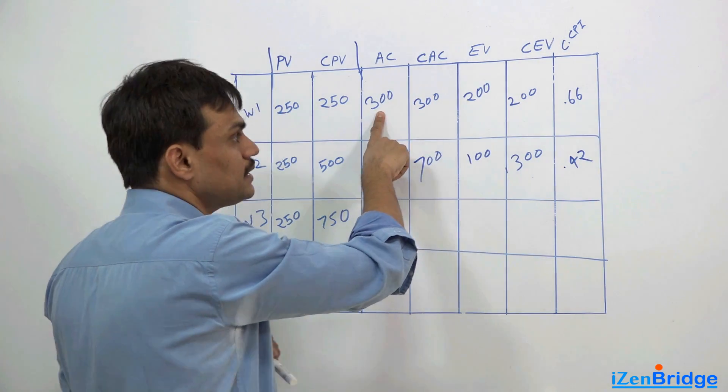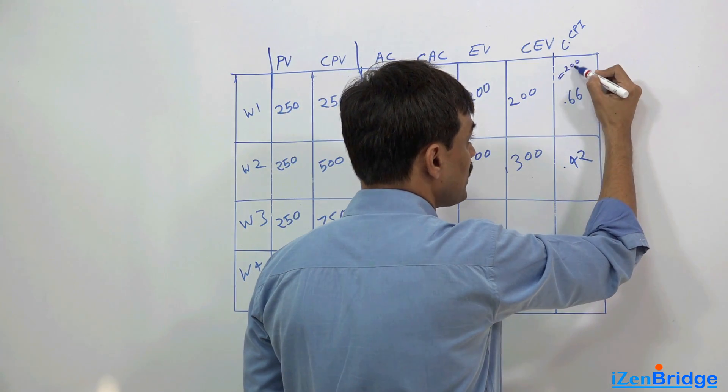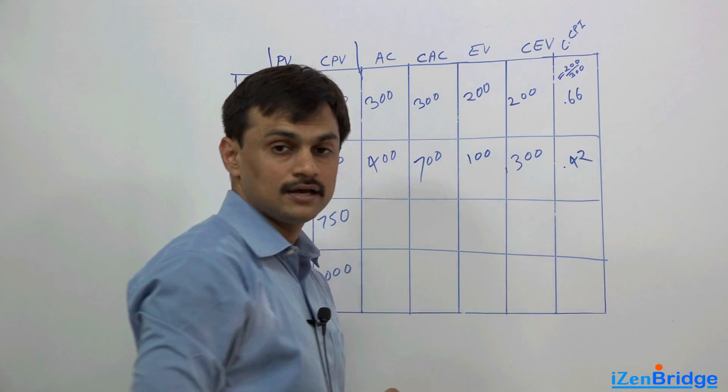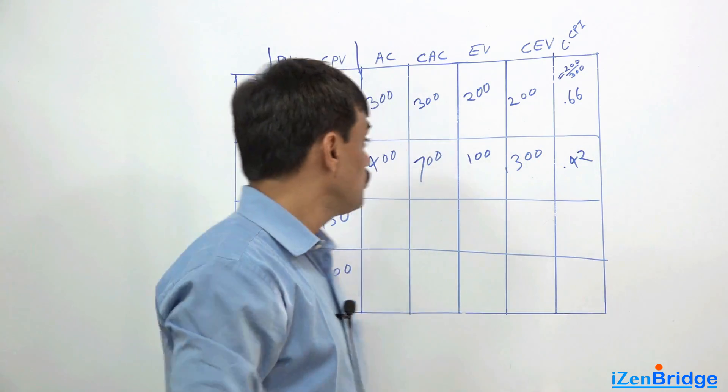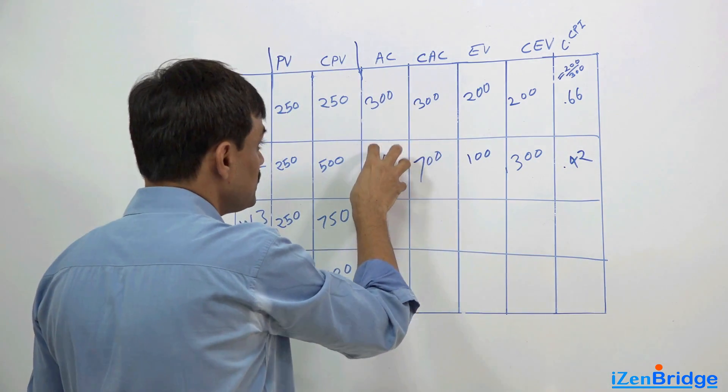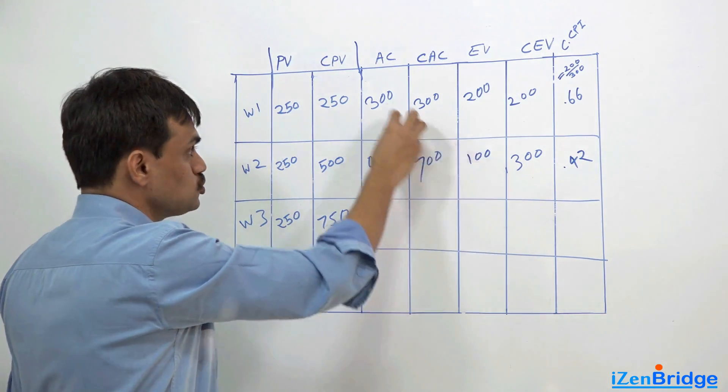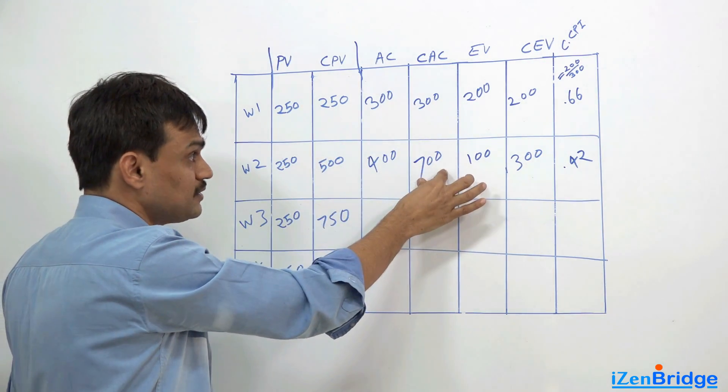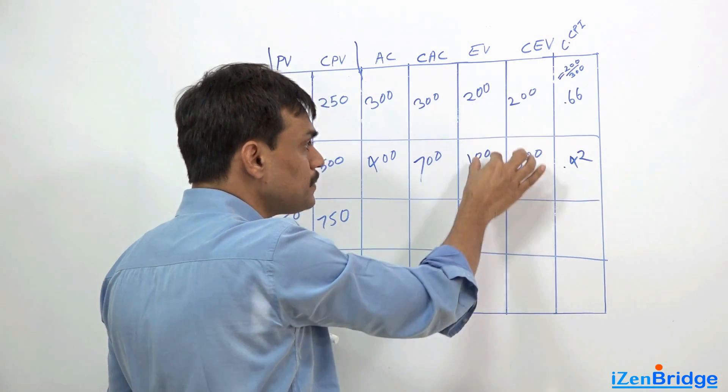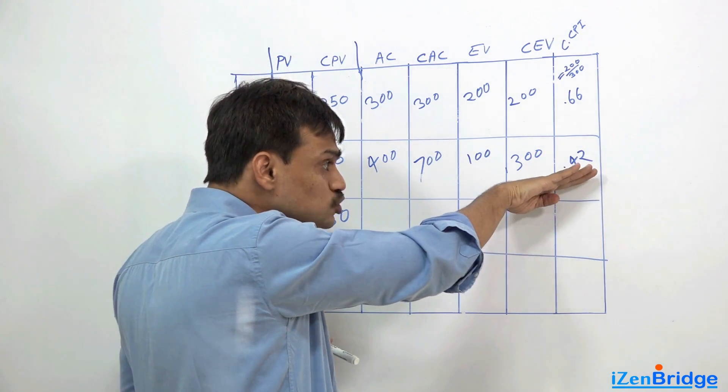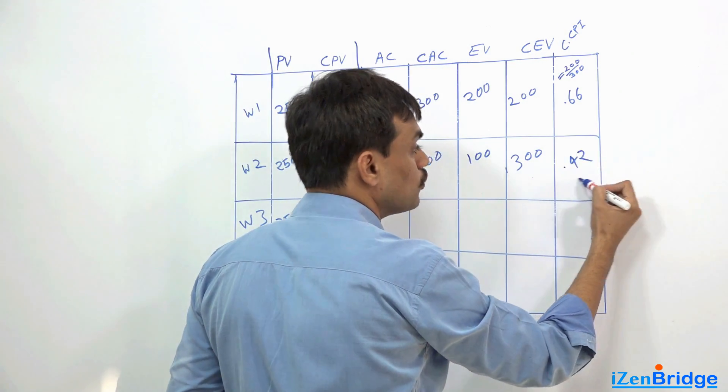We spent $300 and we earned $200. So if I calculate cost performance index which is $200 divided by $300, it comes to 0.66. Our first week cost performance index was 0.66. Then we carry on the work and in the next week we spent $400 and we earned $100. So cumulatively by the end of 2 weeks we spent $700 and cumulatively we earned $300 work.